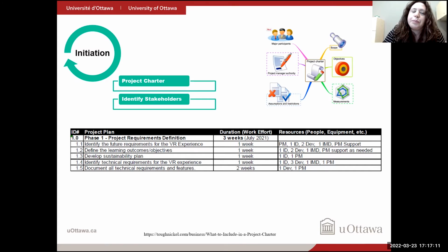And then we have to work out the details about reporting structures because this was an eCampus grant. We would need the partners to report into DFM, and DFM reports back up to eCampus, the funding source. So that's where the PM, or project manager, becomes integral in making sure all those players are connected.